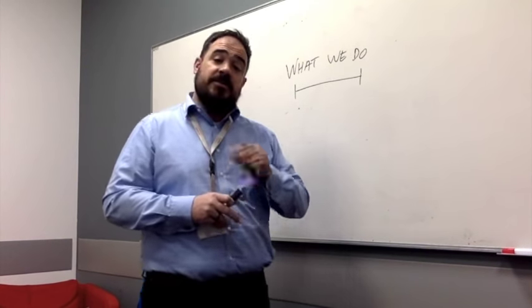These are 4 different criteria in order to help us determine the priority of things. Okay, you will see on there we have things that are expedited. We have things that are fixed date. We have things that are standard. And we have things that are intangible.